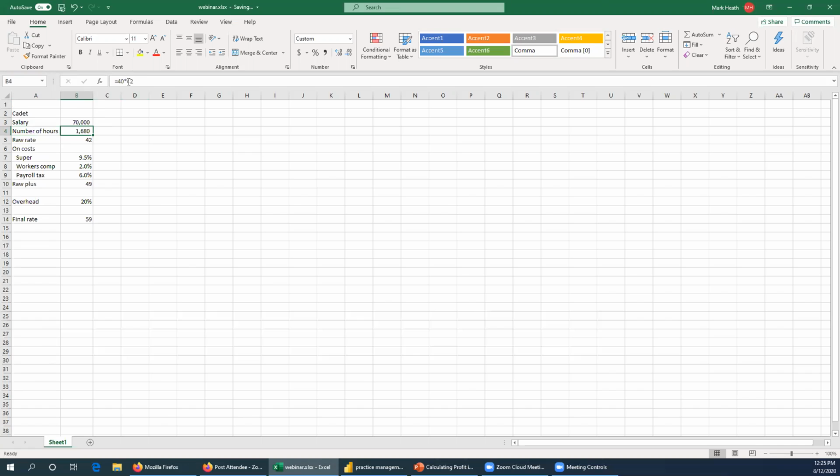And so that's entirely up to you what that is. In this particular one, we've done 40 times 42, so 40 hours a week for 42 weeks in the year. That gives us a raw rate, raw being just their salary being considered, of $42. You can see that division there, rounded to the whole dollar. And then we know about some direct on costs that we can increase that rate by, and we've just put them in, and you can put as many as you know about into there and increase your rate. And that builds it up to 49.